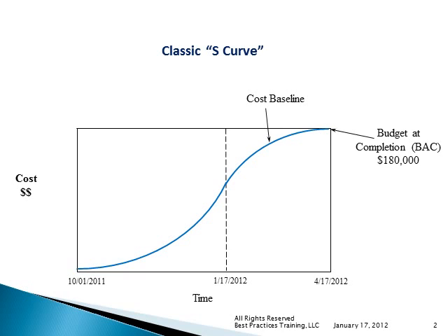So our budgeted completion is the original estimate for what we plan to spend for this project, $180,000. And if we're at January 17th of 2012, then what we estimated to spend at this point in time on the cost baseline is $100,000. That's what we budgeted. That's what we've estimated to spend at this point in time on that date.